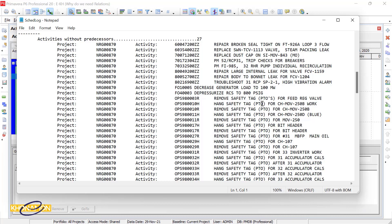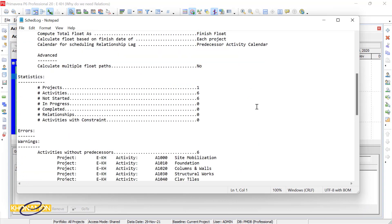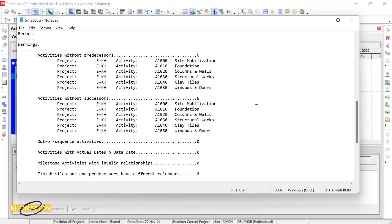So for seeing the log of the building project, we need to first schedule the project, then press View Log. We faced two common View Log challenges. One: we get the warning that no log exists — we solved it by scheduling. Two: the log does not belong to our project — we also solved it by scheduling. That's so simple. When you want to see the correct log report, you need to schedule it first.